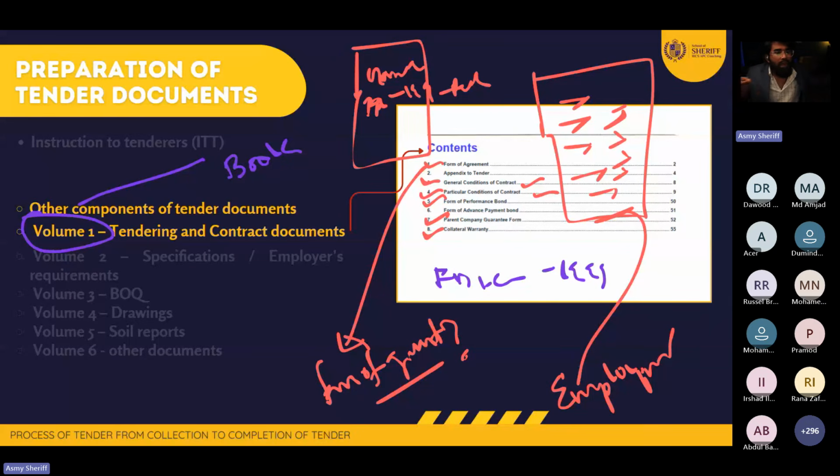In that one, both parties will agree. Both parties mean the client and the contractor. We both, I, Muhammad, and he as John, are agreeing that the work is ABCXYZ, and the contractor will complete the project in 365 days. And I'm confirming I will pay him 200 million to complete ABCXYZ. And we both are agreeing our conditions of contract is general condition FIDIC 1999 amended by particular condition attached with this agreement. So that's what we call the contract agreement.